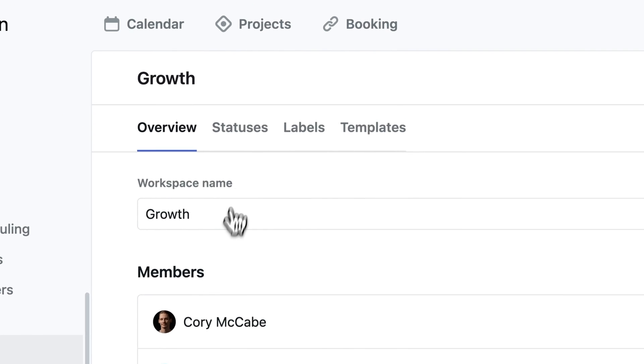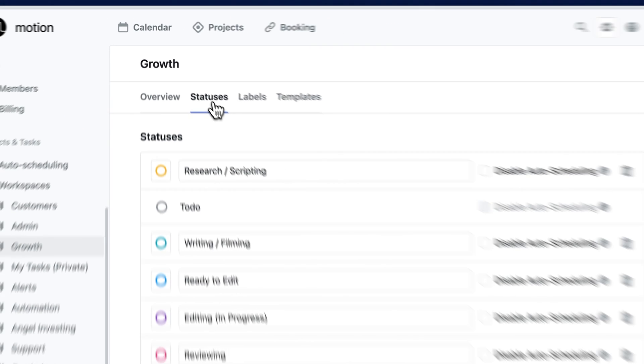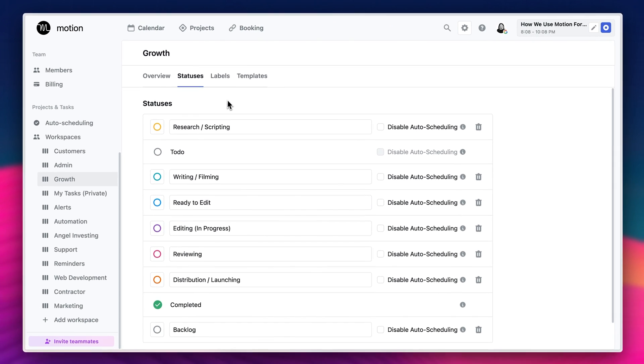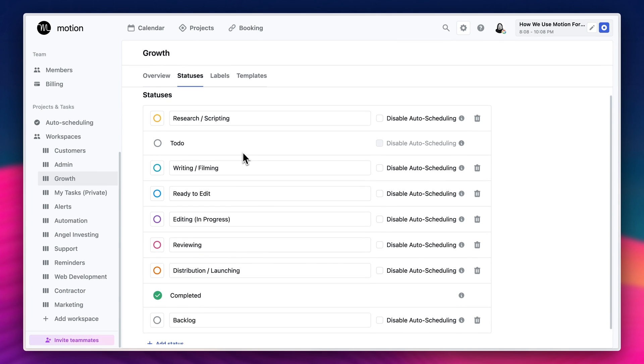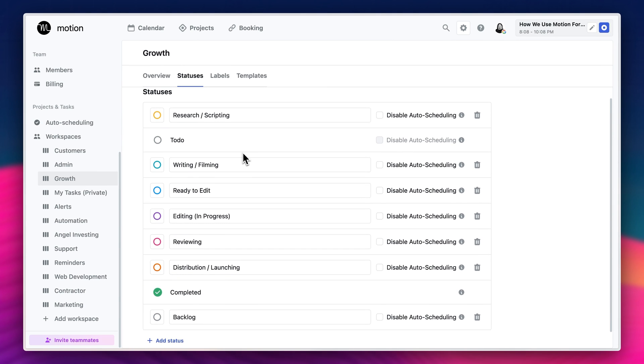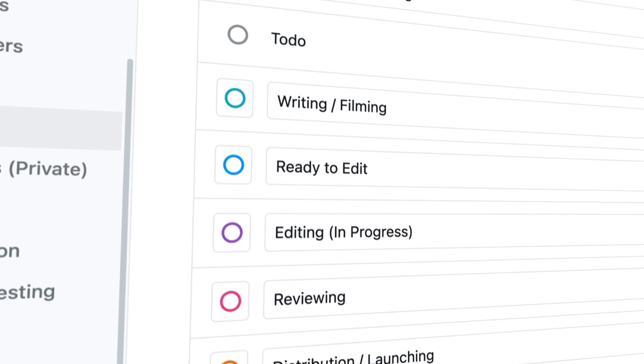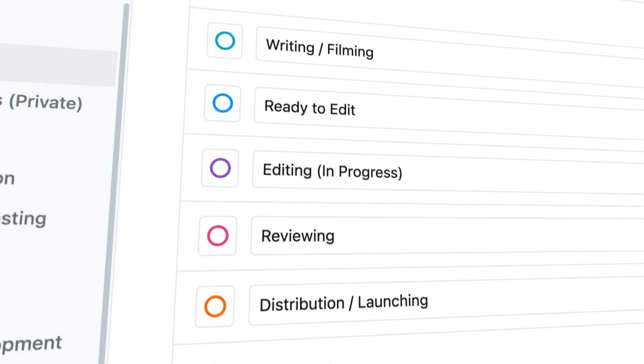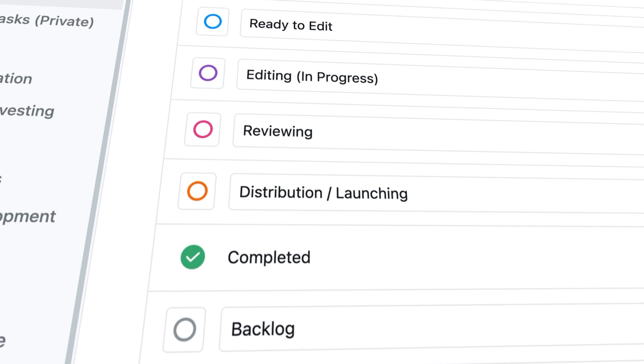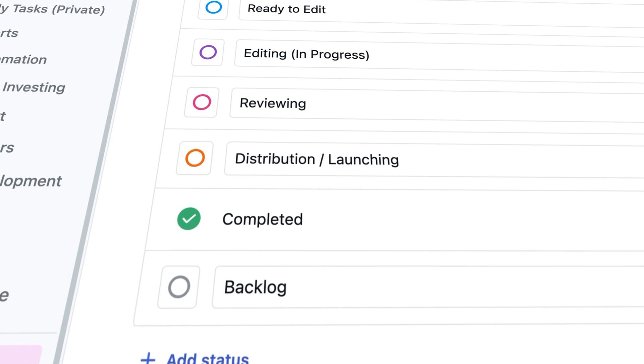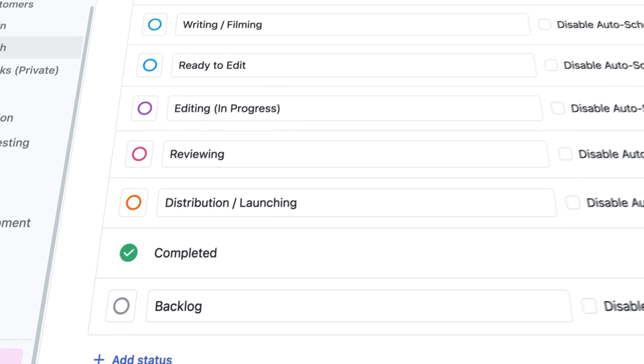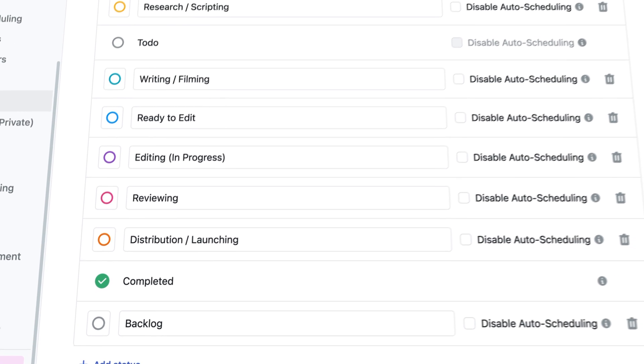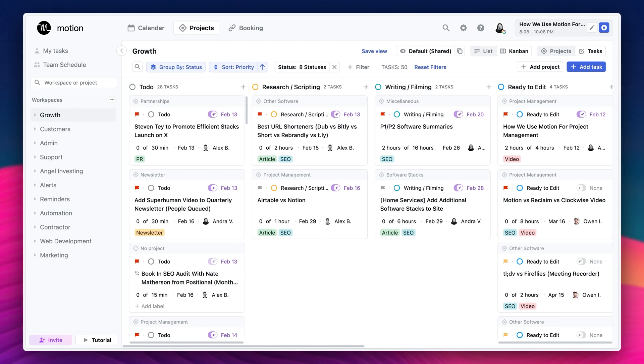To solidify this a little bit more, let us take you through an example of exactly how we use statuses. The majority of our growth projects involve either writing for our website or creating videos. So the statuses that work for our team are our to-dos, our researching and scripting, writing and filming, ready to edit, editing, reviewing, distribution, launching, completed, backlog.